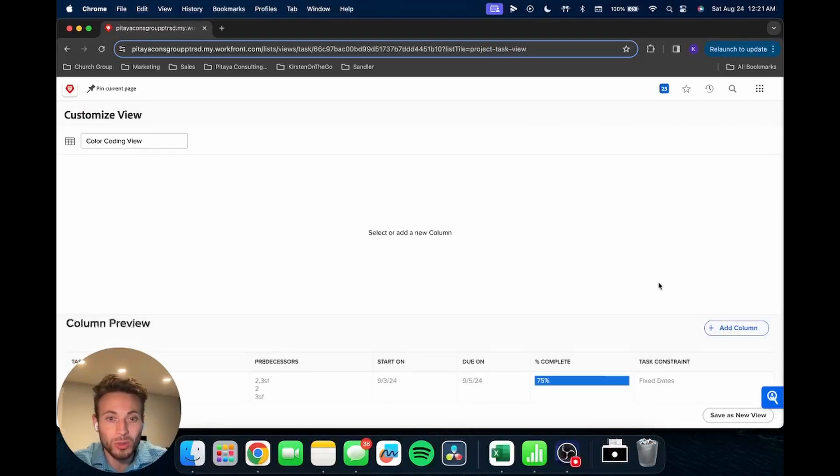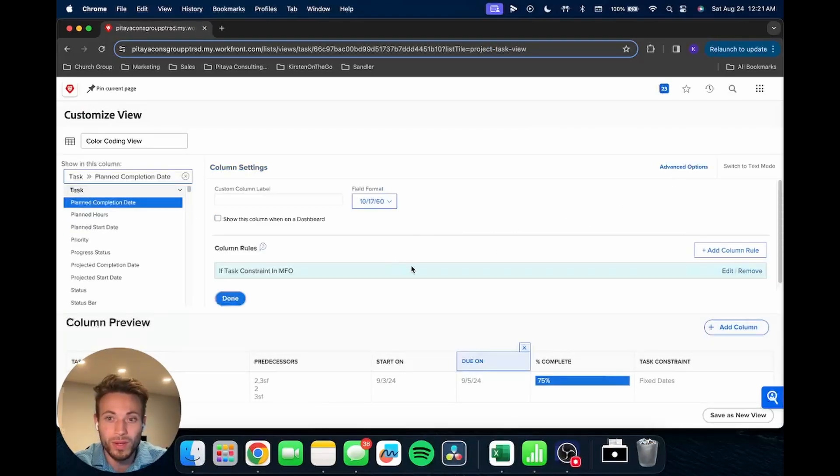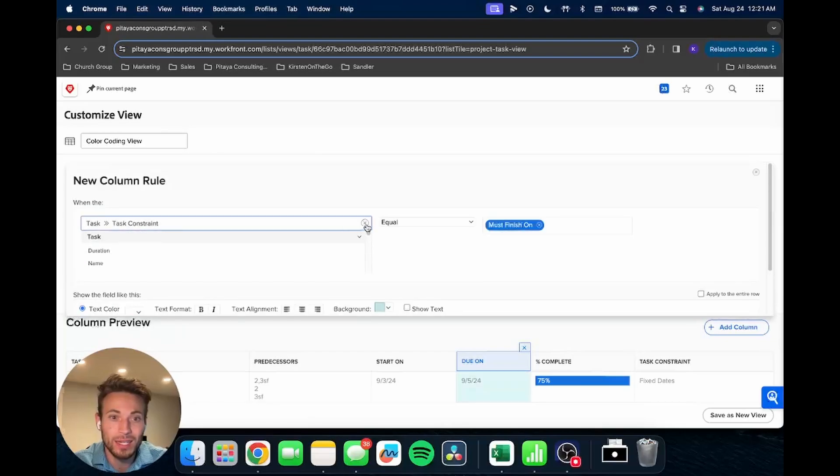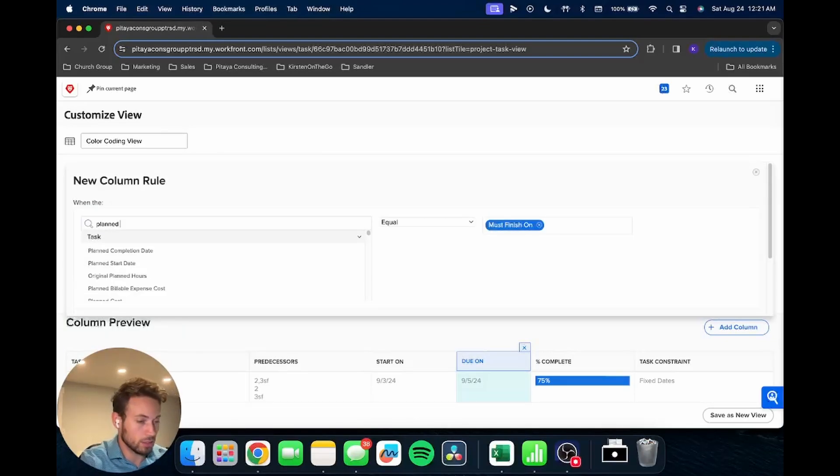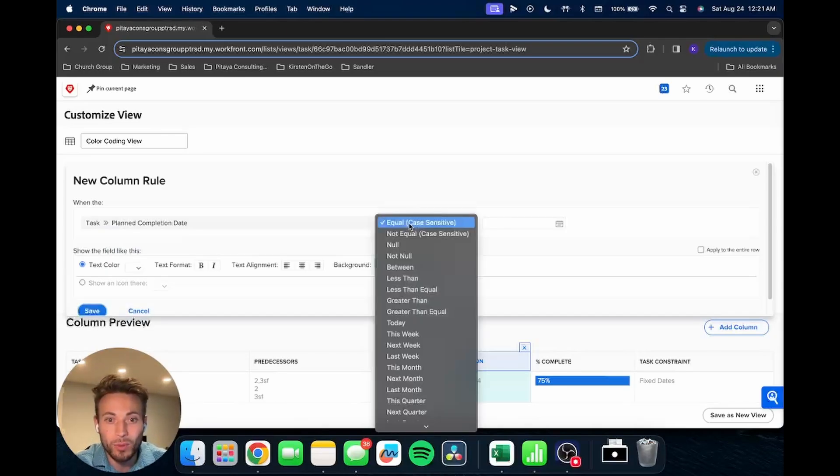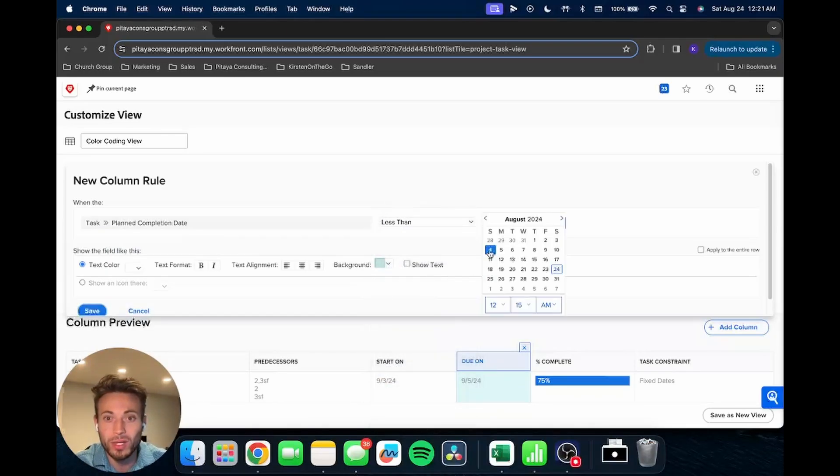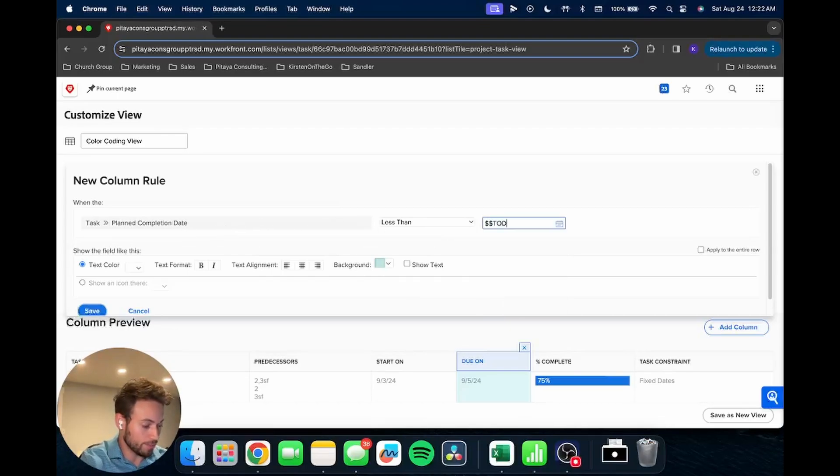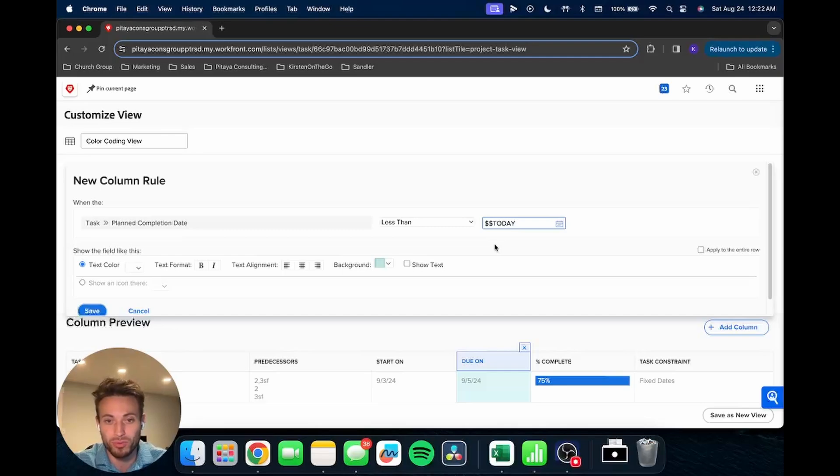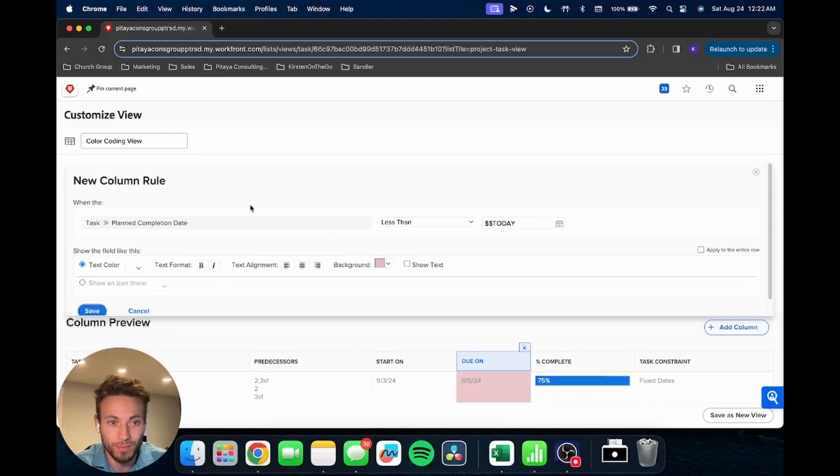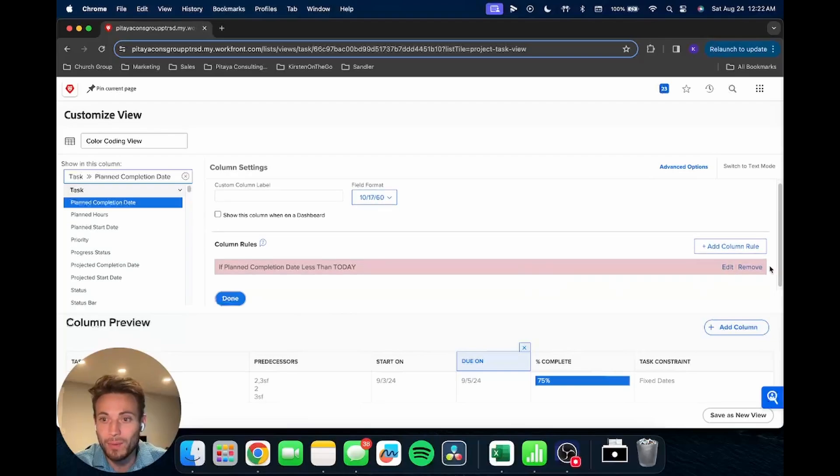Okay. Let's go look at another one. So we'll go back in to edit our view. Go back in to due on to the advanced options. And let's just edit this. And we're going to, this time, go to planned completion date right there. And we're going to set up a rule that's going to make it so it's red if it's late. So we're going to say planned completion date is less than, and we're going to say today. Right? So we're going to use this wildcard, dollar sign, dollar sign, today in all caps. That's Workfront's way to know, okay, we're referring to whatever day is today. Let's change this color to red. So if the due date is late, it's going to show up as red. So we have that.